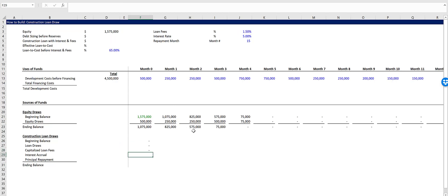And our interest accrual is simply the interest rate, annual interest rate, locked in, divided by 12, times the beginning balance.